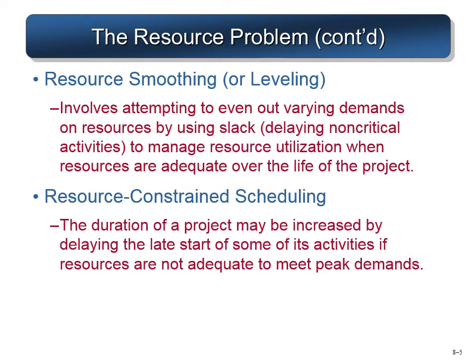The other is resource constrained scheduling. When you make the schedule, you keep your available resources in mind. You cannot do it just on the time requirement, then you might be making some mistake. But again, we might have some time constraint. So based on the resources, you try to find the most optimum time.